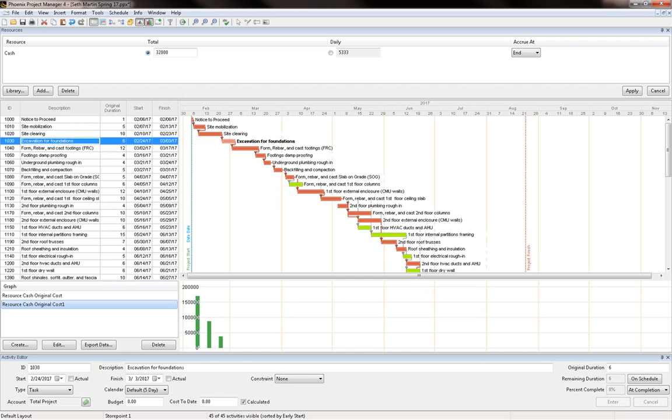Now let's proceed to the next part, which is talking about calendars. Let's say you have an architect engineer who works only 5 days a week, whereas the site is going to work 6 days a week. The architect engineer has some activities related to the approval of submittals, the approval of shop drawings, some inspections, and so on. So these are going to be done only on a 5-day basis, whereas the site is going to be working on a 6 workday basis.